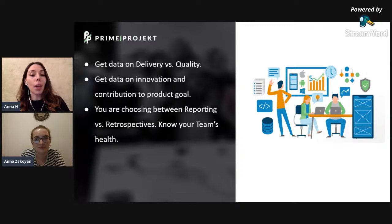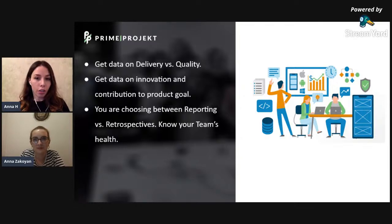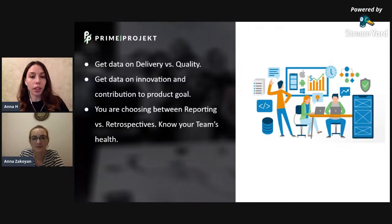But as long as you're not measuring how many issues or bugs were produced as a result of those features being delivered, you're not really getting valuable insights here. Let's say you had a major release delivering several key features to your users, well anticipated features, but how many critical bugs did you have to address in the upcoming days or weeks? These are the figures that you need to compare to get the full context on your delivery, whether the quality is being neglected.